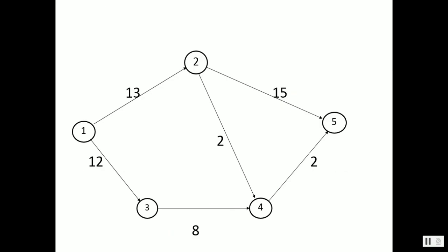We can write it like this also, eliminating A, B, C, D, E, F. Finally, after constructing the network diagram on the basis of the input and calculating time expected on the basis of the three time estimates assigned to each activity, this is the final shape of the network diagram, assigning time expected to each and every activity.